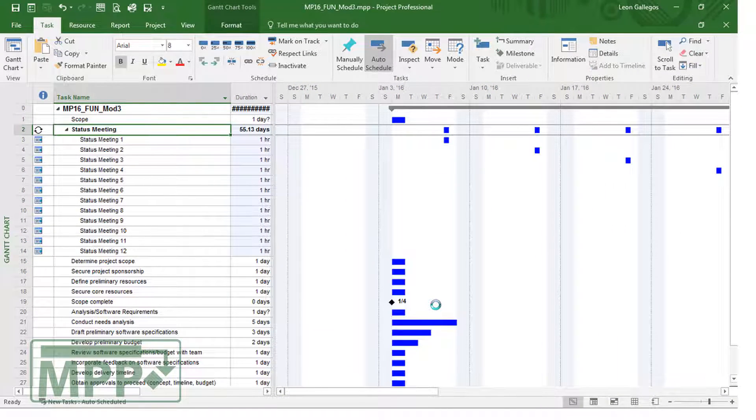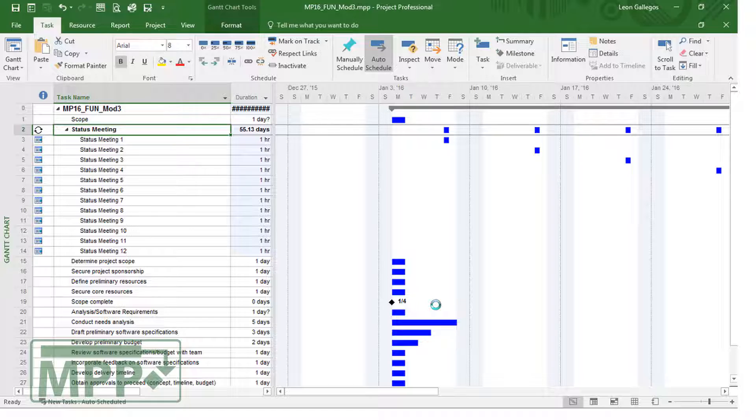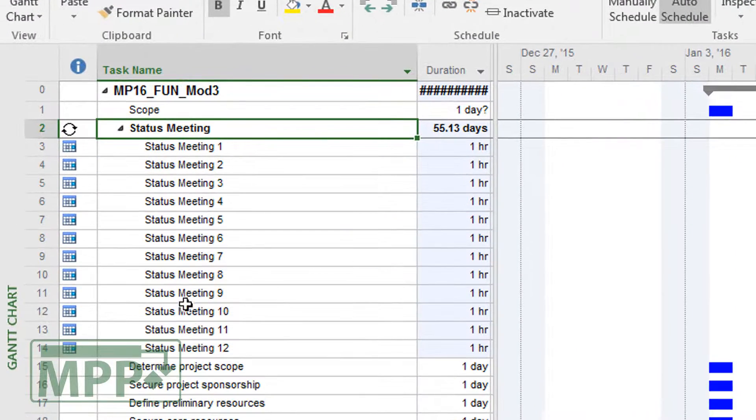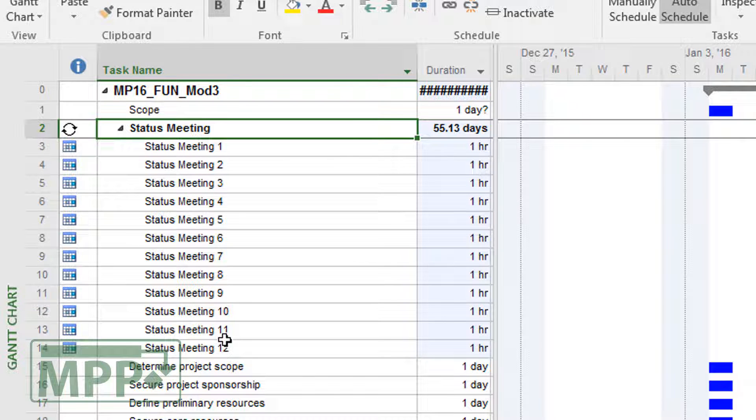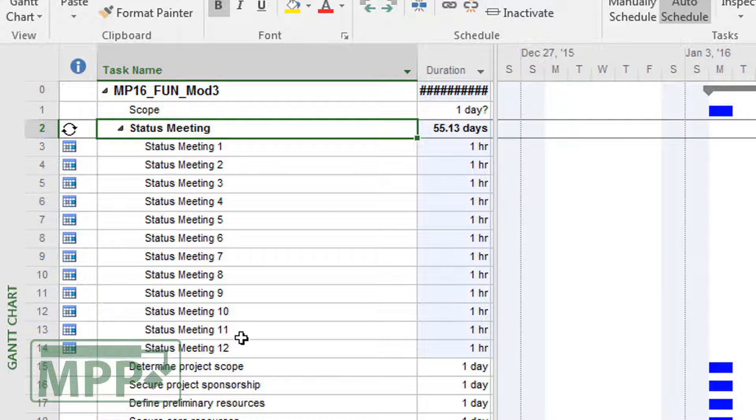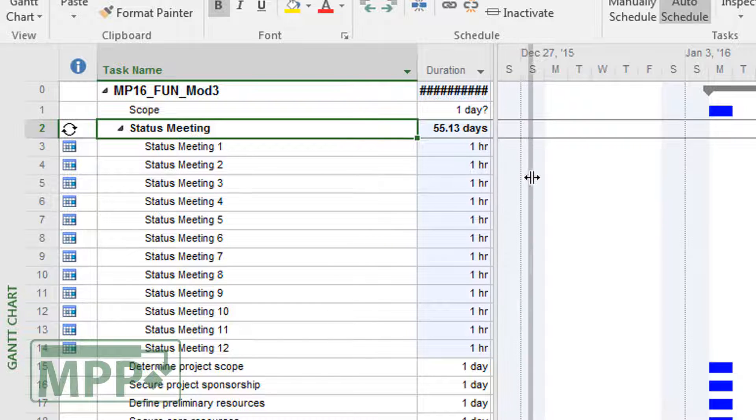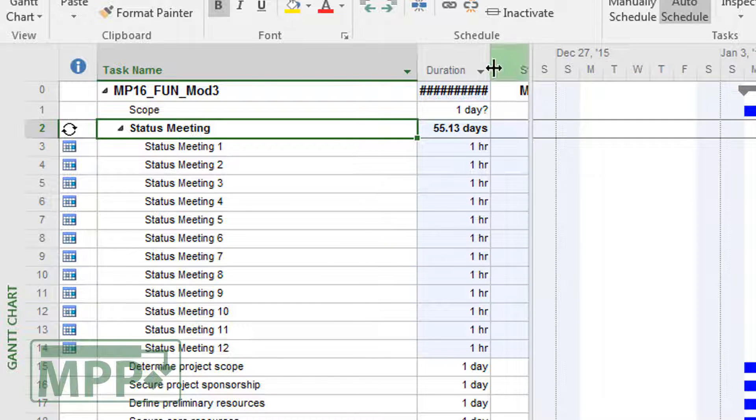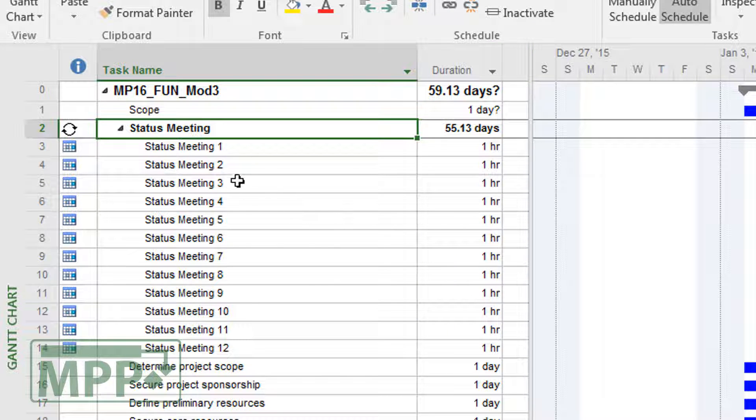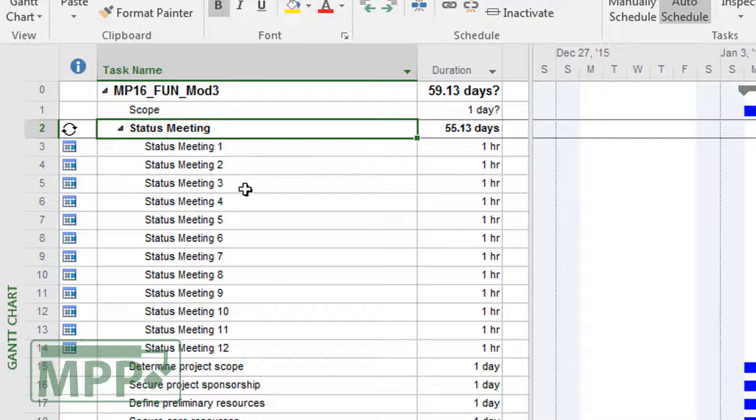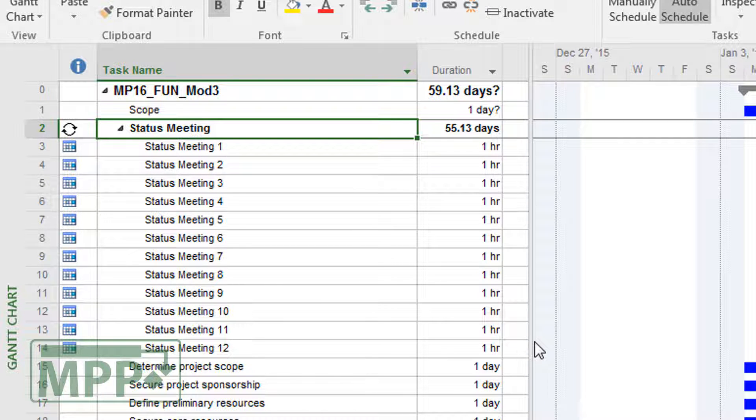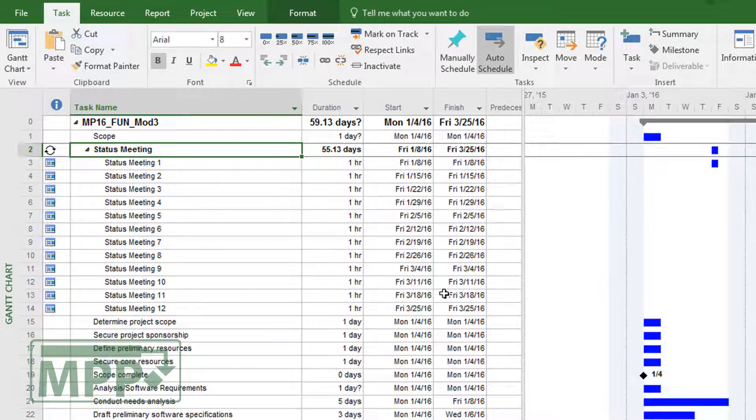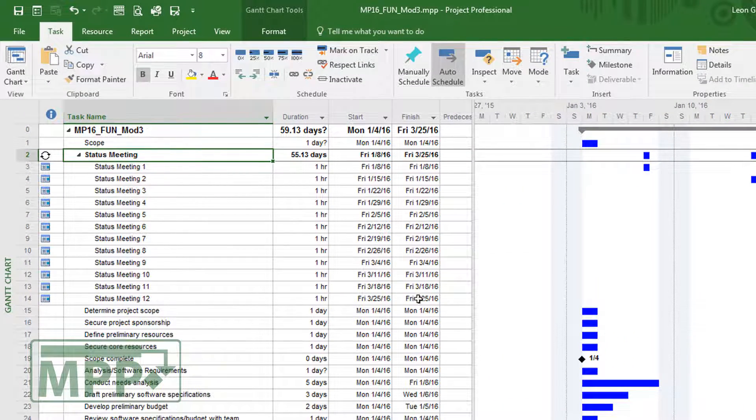It sets up all of those meetings. You'll notice that it indents them. We'll talk about this more as we go through this training about how we set that up. But you'll notice that in this case, for a recurring task, it's going to group them in this manner here. So I'll grab this split bar and move this over so that you can see that. So each of these instances is a meeting. You have status meeting 1 through 12 because we told it that we were going to end on a particular date, in this case 3/25. So notice that it just sticks it right there.